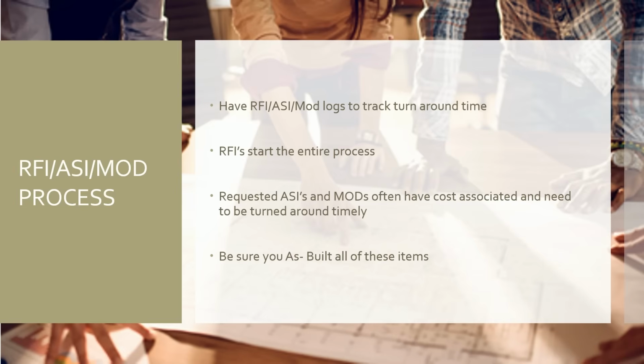Yeah, so whether it's a digital file or a paper or hard copy, you should have a spec book. And you should have your ASI set of prints and plans. You should be posting the RFIs in there. You should be posting your ASIs, architectural supplemental information, and your mods. Tracking those just like you would submittals, posting them appropriately, and making sure that they get in front of the people that they should be getting in front of.